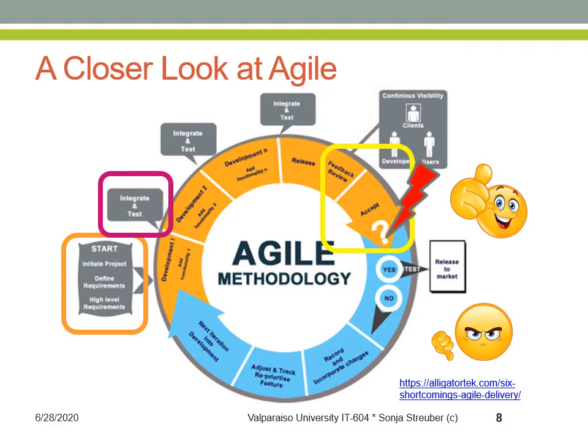Just like in a waterfall situation, the relationship between scope and time is real. And if you have enough budget, you might be able to add more people to the team to get the next sprint done without any problems. Or you might have to add 1 or 2 more sprints on to what you thought was the end of the project. But then it's also important to ensure that you keep track of the money.